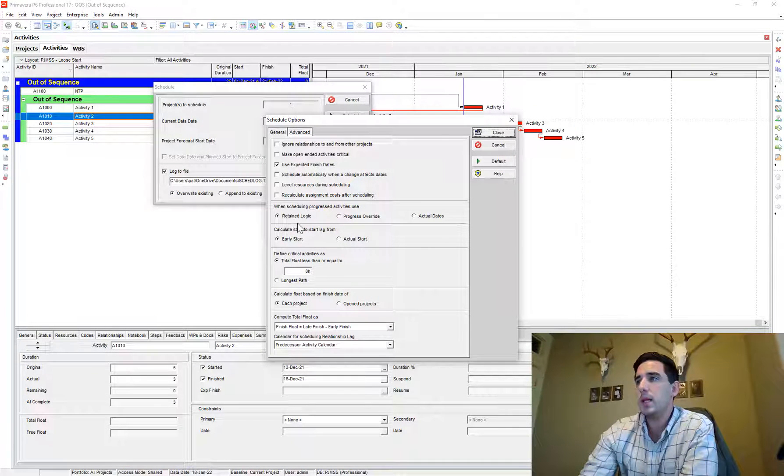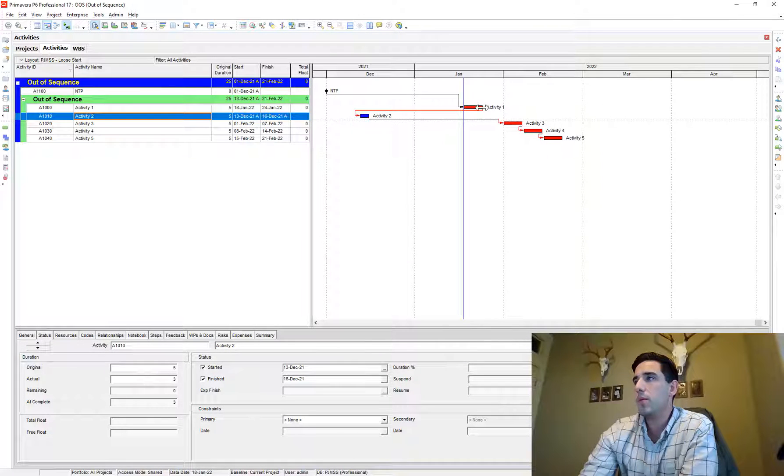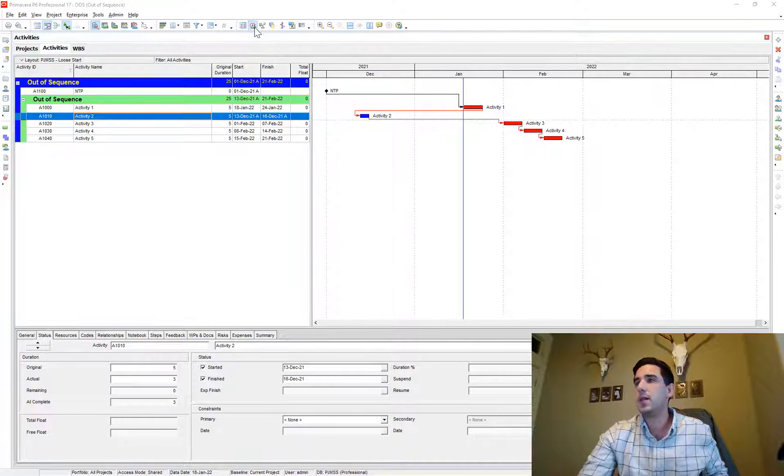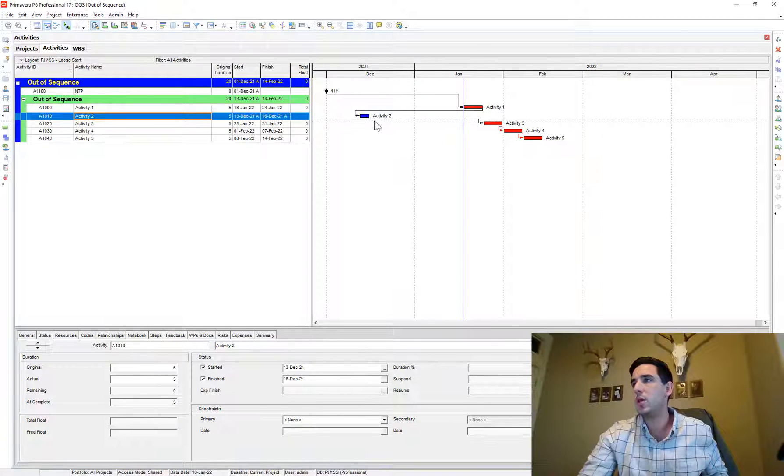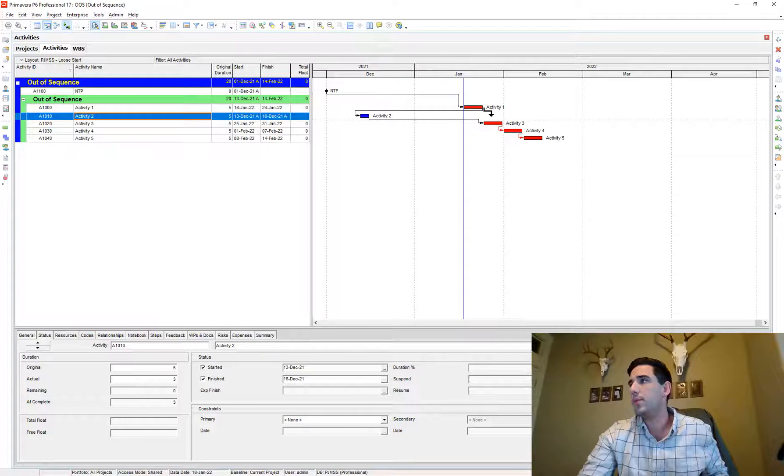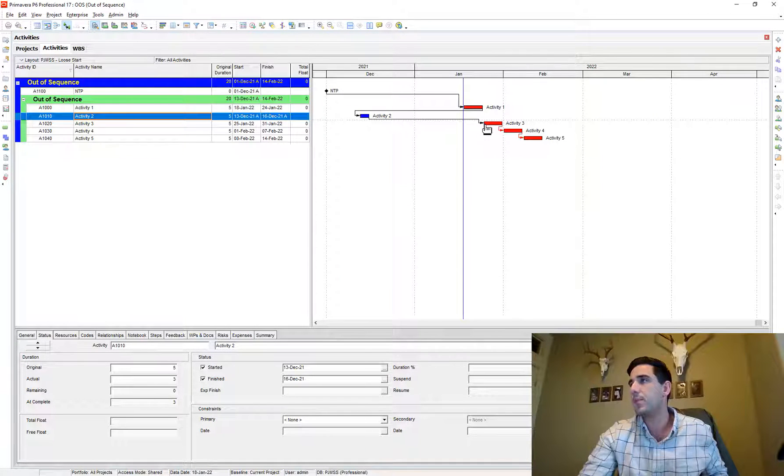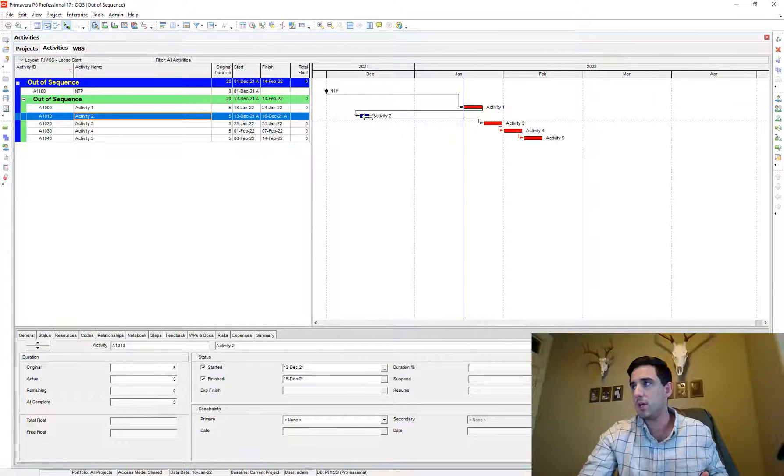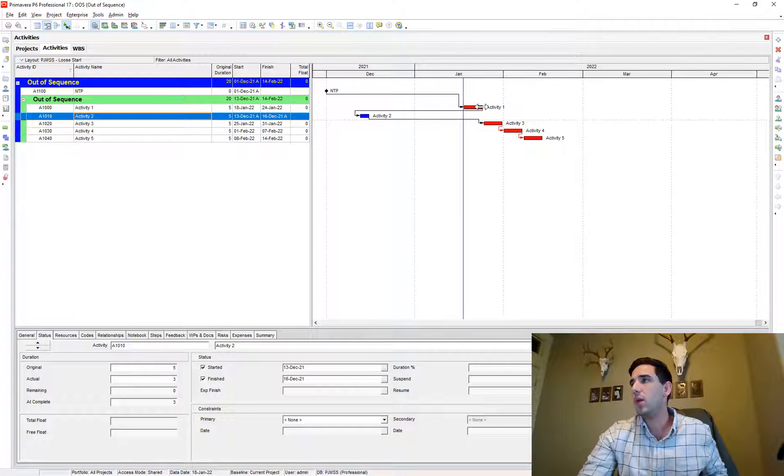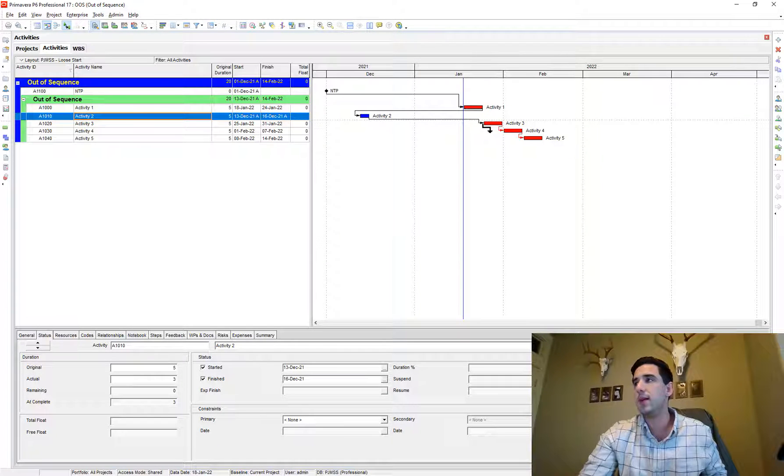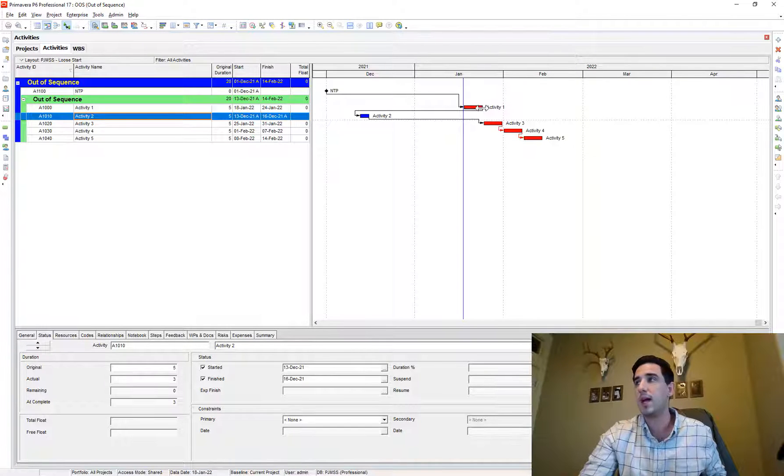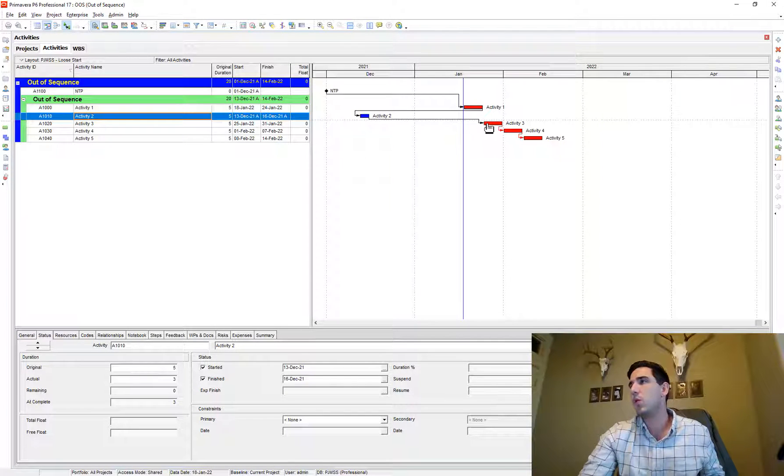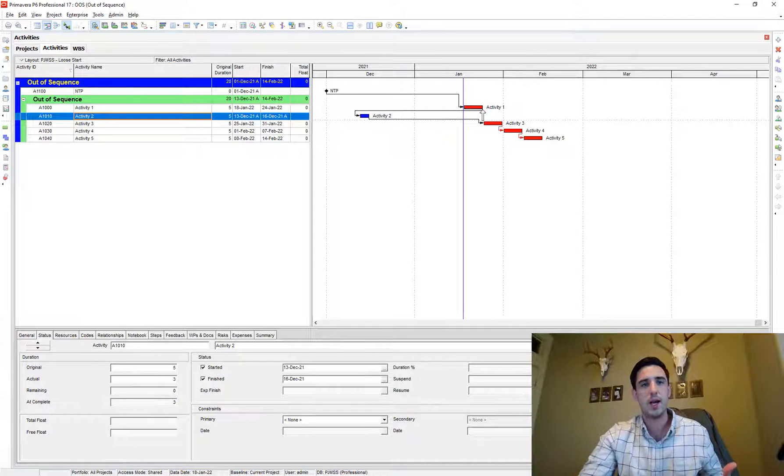So retain logic basically honors the relationship that you have regardless of out of sequence progress. So let me show you if I was to actually schedule this project, activity two has finished and you'll notice activity one, although it doesn't have a direct tie to activity three, using retained logic, it honors the relationship through activity two, which finished out of sequence. And it assumes that activity one therefore is a predecessor still to activity three, and it honors that relationship. And so there's kind of an invisible tie here between activity one and three or indirect tie.